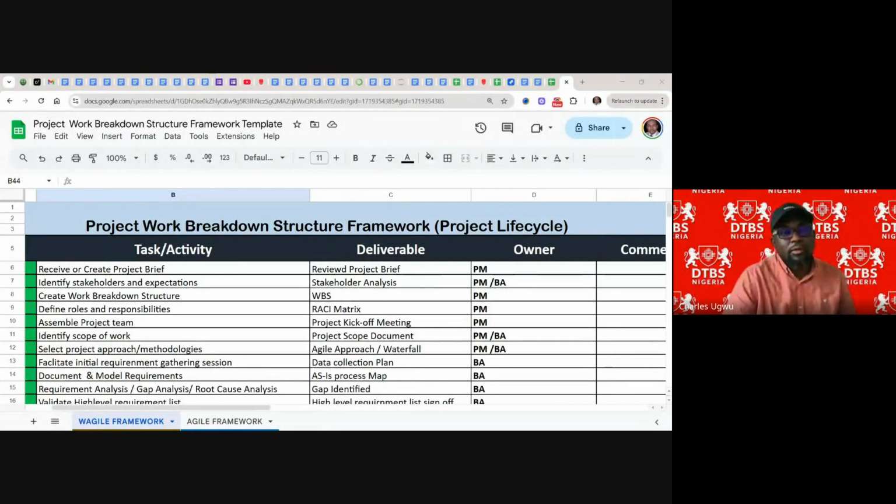You need to make room for contingencies, and have a buffer. You keep a buffer so that you can fall back on it whenever you have an issue. Meaning that we've talked about that if you have like 50,000, you keep a buffer of like 10,000 pounds out of the 50. You work with 40.